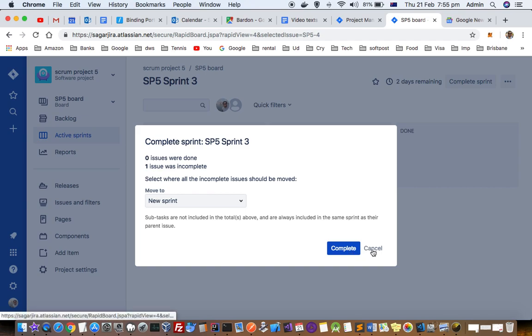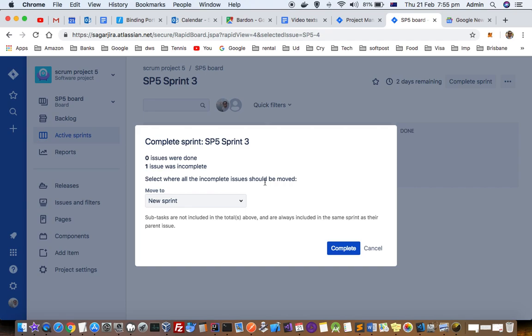Basically, normally all the issues should be in the done status or the last column, and then only you can complete. Even if the issues are not in done, you can complete the sprint, but that is not the ideal scenario. Ideally, you have to get all the issues in done status.